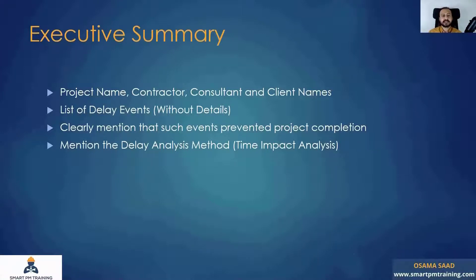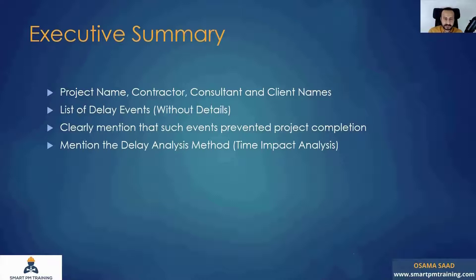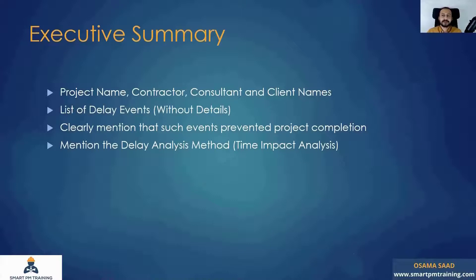Not many contracts actually recommend delay analysis methods, and there's no clear trend. Many people in advanced communities about delay analysis and contract administration are talking about changing that. The argument is: if there's a disagreement about which method to use, don't come after one year and demand a specific method — make it a part of the contract conditions. As a contractor, before I bid the project, I should know upfront what's required. Clients often initiate disputes by not making their requirements clear.